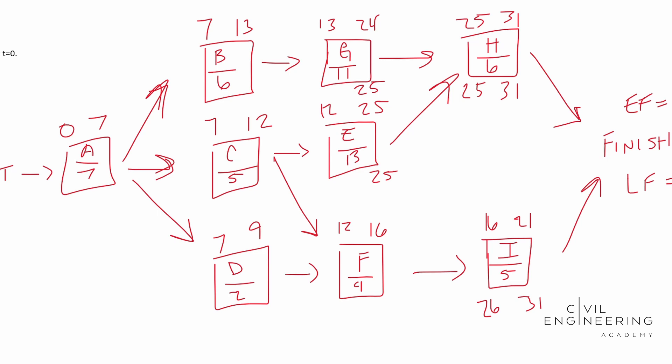Cool. So 25 minus 11, that's going to be 14. 25 minus 13, that's going to be 12. F, 26 minus four is 22. D, the earliest finish or the latest finish can be day 22 and it's two days long. So this means day 20. So that means day 20 is going to be your late start for D.